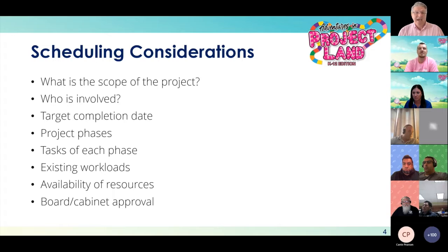It's important to create tasks under each one of those phases as well, and really focus on who's going to be responsible for those tasks. Again, I talked about this a little bit in my morning session: make sure that you're evaluating existing workloads as well. It's really easy to think, okay, we can accomplish this in 3-4 weeks without evaluating what others might have going on during that time frame as well.